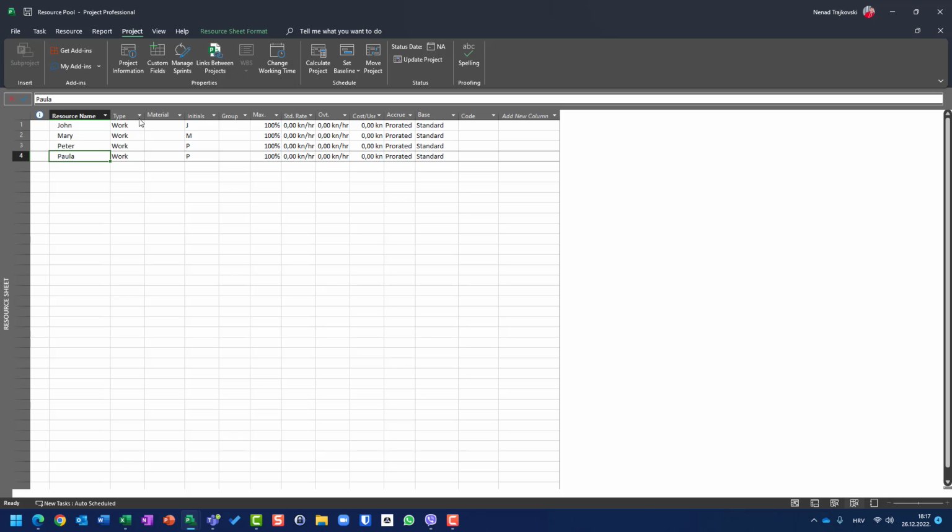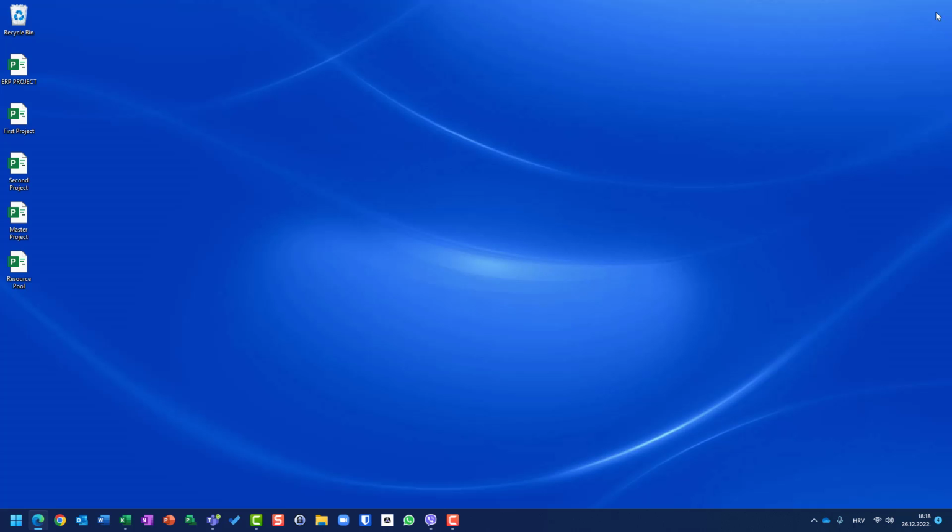You should put resources, of course, standard rate, overtime rate, cost per use, everything like you are creating a normal project. Instead, you are not creating a normal project, you are creating resources for all projects and calendars. Now, be aware that when I close everything, when you want to use the resource pool for the first time for the project, you should open it.